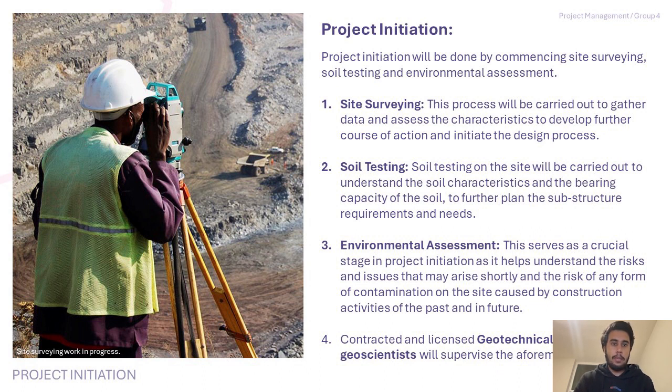And then an environmental assessment is also very important. An environmental assessment basically will help us understand any risks or any issues that may arise in the construction process related to the soil, related to the neighboring areas, or any kind of environmental thing that could cause an obstruction in the construction activities. And obviously all of these activities are going to be done under the supervision of a licensed geotechnical engineer or a professional person in this field who has knowledge and expertise about these processes, because it is one of the most important processes of the construction phase.